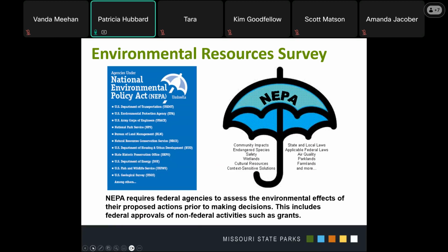Before we dive into the application itself, we're going to be talking about why the LWCF grant is required to do an environmental review. It was enacted in 1970. The National Environmental Protection Act, or NEPA for short, is a federal law that requires federal agencies to assess the environmental effect of their proposed actions/projects prior to making a decision to undertake that action or project.